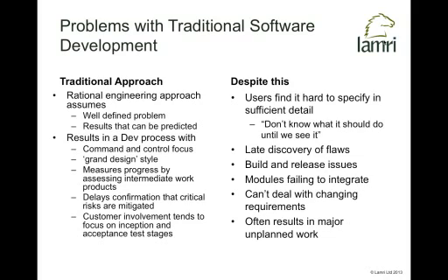When you tag that back to the first point, that people find as a rule it's really hard to specify up front in detail, you can see you've potentially got a problem, because almost inevitably you're going to have changing requirements, simply because people found it hard to write the things in the first place. And the result of this straitjacket type of approach is that we often end up with big, major, unplanned lumps of work at the back end of the life cycle when we can least afford it.